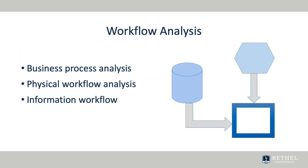Workflow can be started in the system acquisition phase and continue into the implementation phase. It is best to document the existing workflows — the business process, physical workflow, and information workflow — prior to implementing specific hardware and software. The physical layout of the hospital or physician practice can influence the layout of the hardware, as well as the flow of a client through the clinic or through the emergency department. The new workflow should be established and analyzed prior to making decisions on hardware and wiring, so that the installation doesn't look as if the designer was trying to fit a round peg into a square hole.